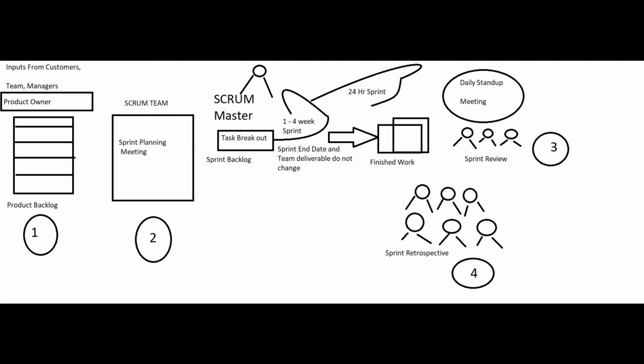So what is a scrum meeting? The scrum master will conduct this scrum meeting every day. On each day of the sprint the team holds a scrum meeting, also called the daily stand-up meeting. The maximum time bound of this scrum meeting is 30 minutes, or simply 15 minutes.